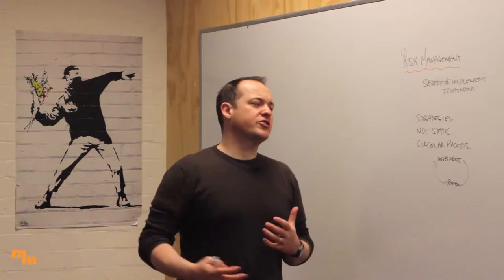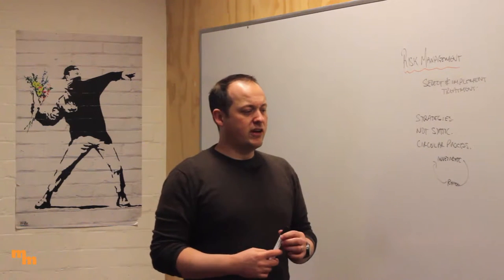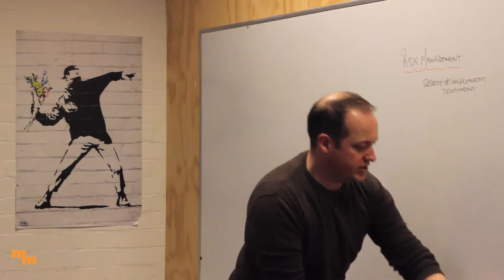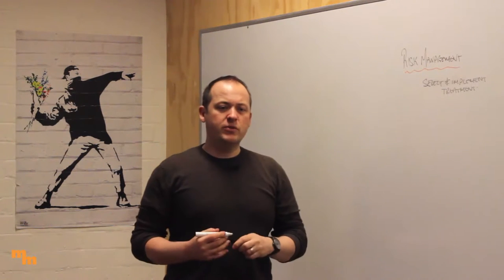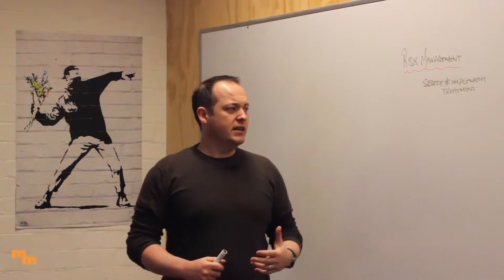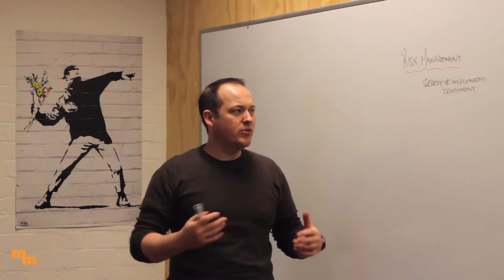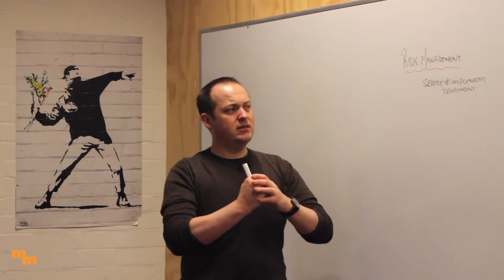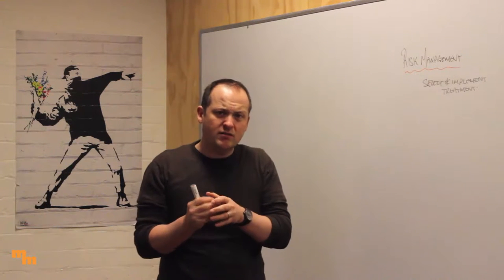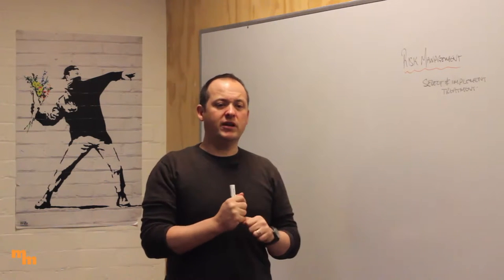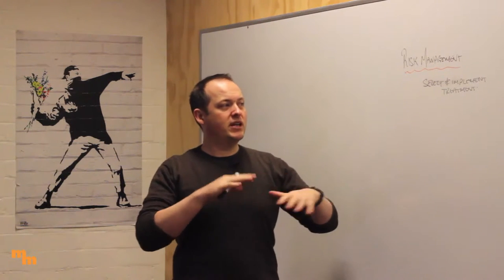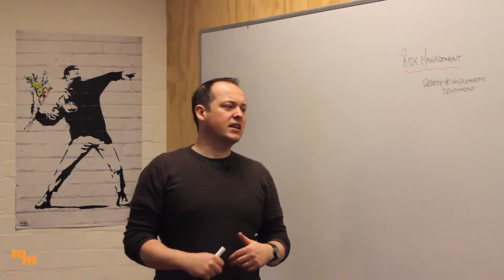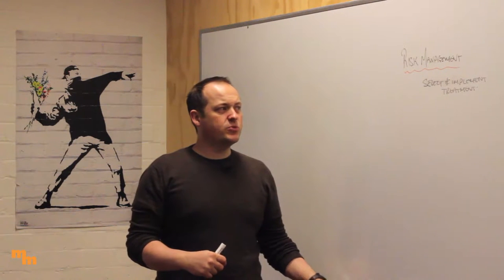There are a couple of different strategies we can implement when going through this. When we think about fixing risk, the first strategy is: can we avoid the risk — can we just get rid of it? Can we reduce the likelihood or consequence? Can we transfer the risk to someone else through insurance or outsourcing? Can we isolate the problem or isolate people from it? Or do we have to retain the risk at the end of the day?